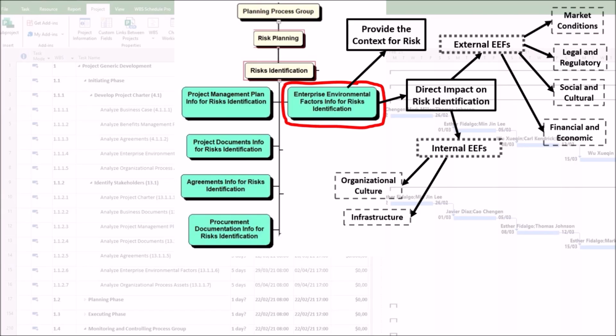Third, internal policies and processes. Examples include procurement policies, HR guidelines, and change control procedures. The identified risk is that a slow purchasing process can delay critical components. Restrictive HR policies can hinder the hiring of qualified personnel.